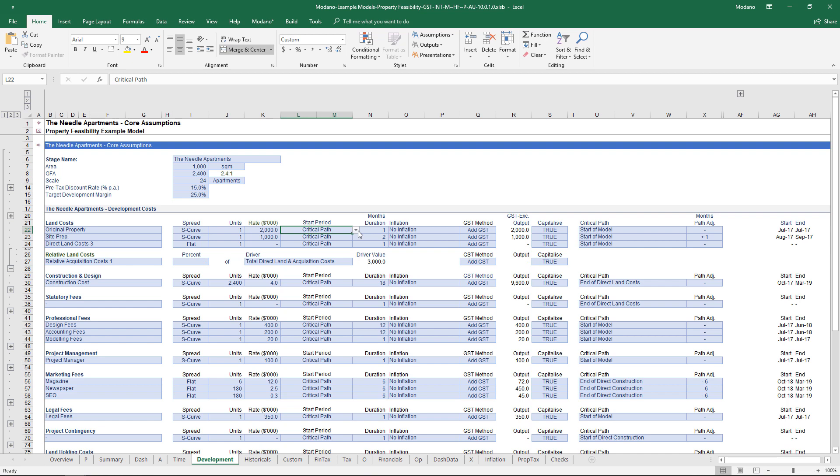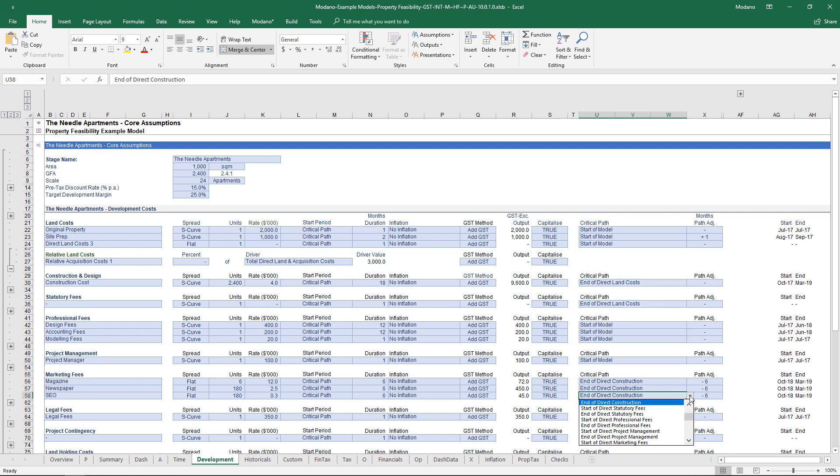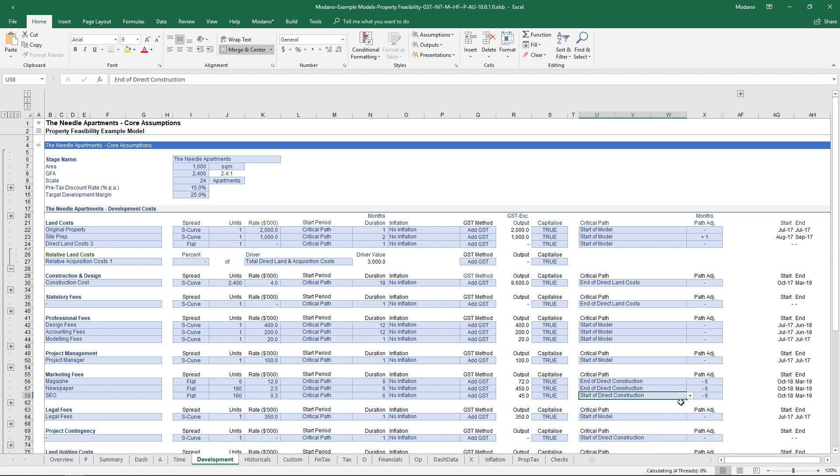In terms of new cutting edge feasibility technology, our FESO models breathe. We have this comprehensive critical path concept that allows you to string together and create relationships between different cost profiles, such that if you have a blowout in a subdivision, you can understand the impact of that delay on all your other cash flows.